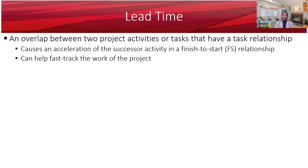From a project management perspective, a lead time is an overlap between two project activities or tasks that have a relationship. A lead time will cause an acceleration of the successor activity in a finish-to-start relationship. You can use lead time to fast track the work of your project, or to expedite the schedule of your project.